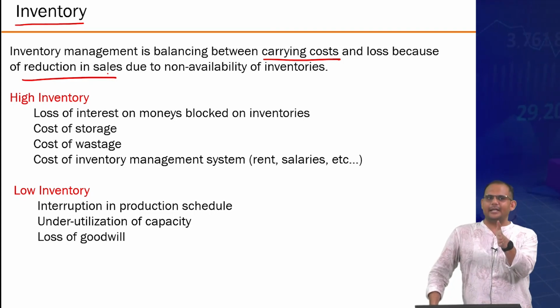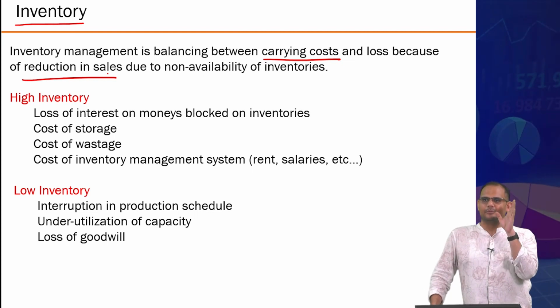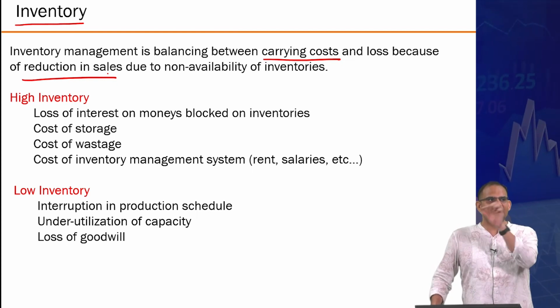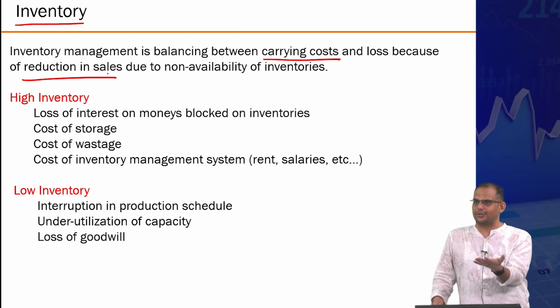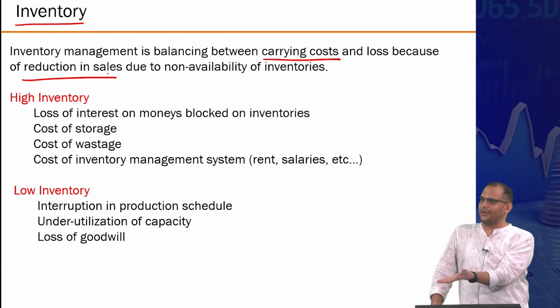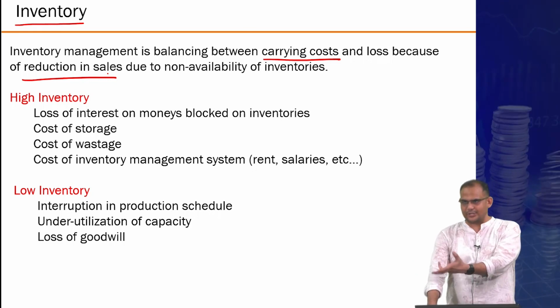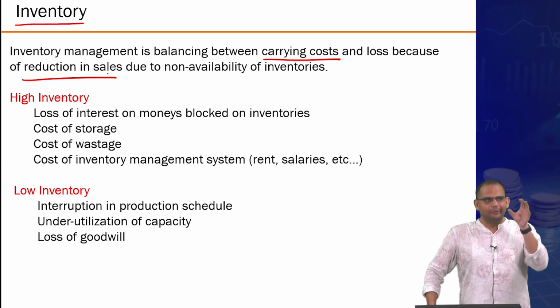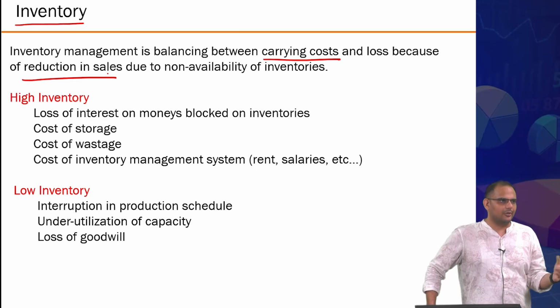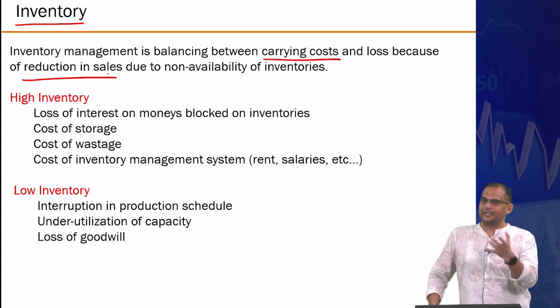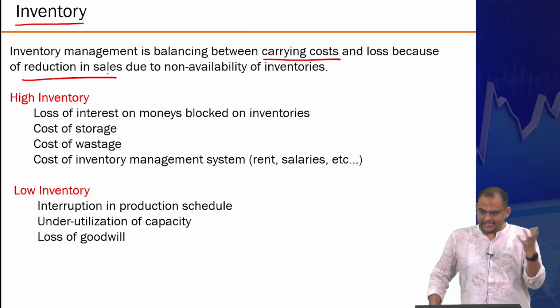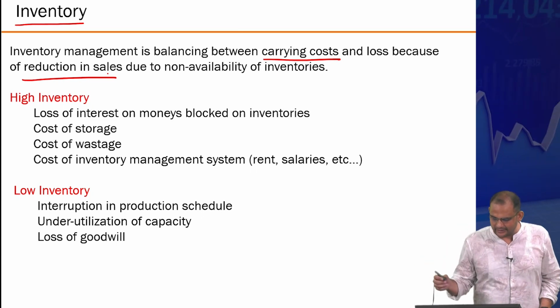If you do not maintain stock, there is a possibility that on a certain day you will not have the necessary equipment or machine or resources to do the activity. So your production of construction activity will stop. At the same time, if you have too much stock, that also is not good because you need to pay higher money to just put that on your balance sheet or even to maintain that kind of a stock at your site in a physical sense, right?